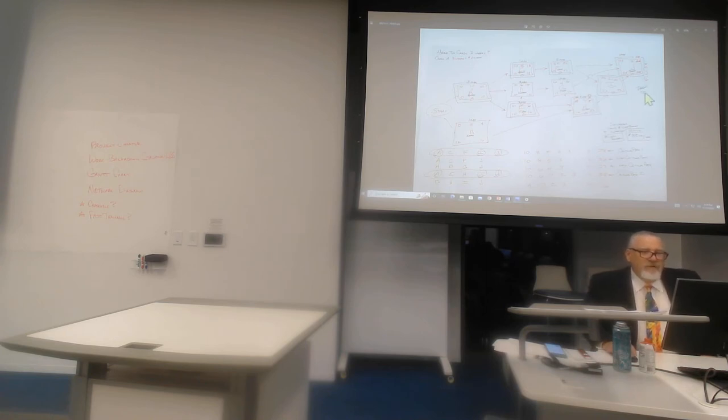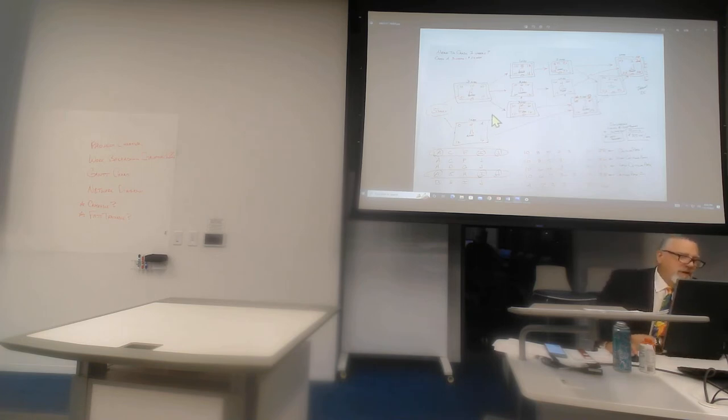So to go to a target of 25 weeks, that means we have several things that we have to work on, right? And there's a charge of crashing stuff. I put those charges in black ink for each activity. So for A, there's a charge of $8,000. C, there's $9,000. F, there's $6,000. I, there's no charge because you can't crash it. And J, you can crash for $9,000. Is that right so far?